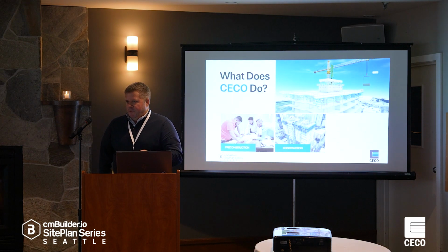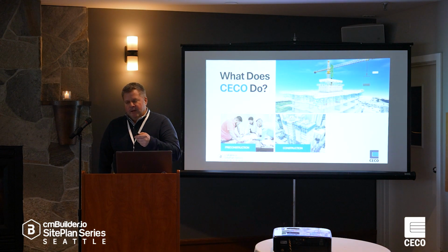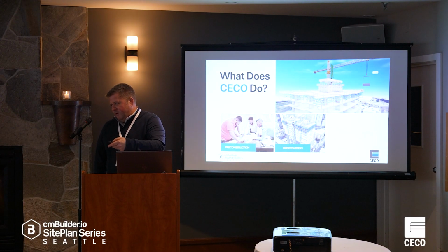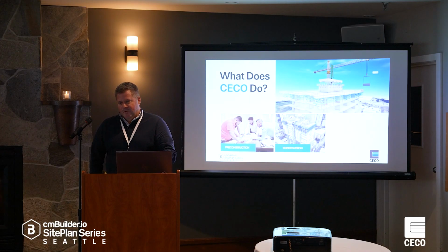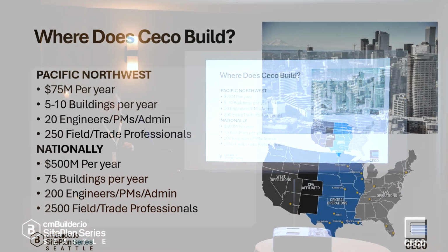If we're doing formwork only, it could be 90% labor. If we're doing full Division 3, it's 50% labor. And where the rubber meets the road is down at the crew leader level, the person running 5 or 6 people. Do they understand what's expected of them for the day? And do they understand who's coming next and who's coming before them?